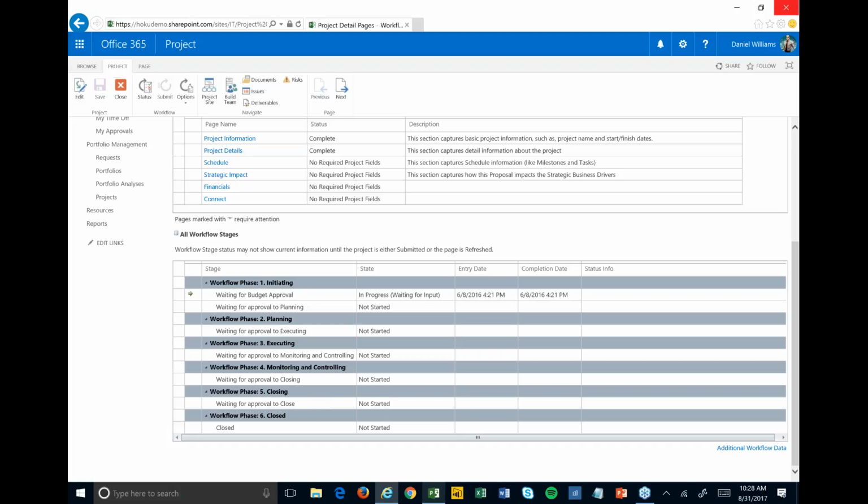As you go from each stage to the next, we can send out email notifications to people saying, hey, just to make sure you're aware. We can also send out approval tasks. So before you can move to the next stage, we have to get approval by multiple people or a group of people or whatever it might be. So it really helps to automate that process and work your way all the way through to the end.